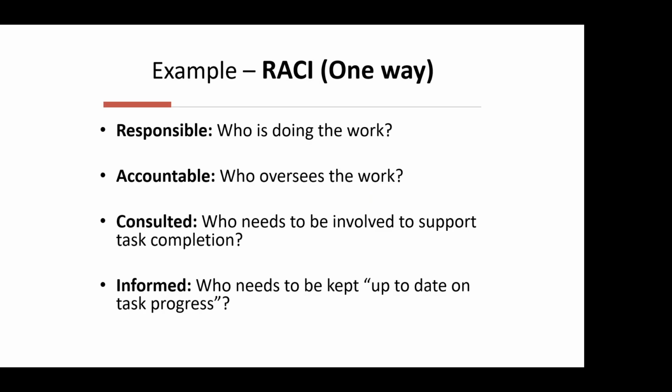Basically the bottom line is you want to list the tasks and the people that are going to accomplish everything by defining the R, who is responsible, which means who is actually doing the work. Then you want to talk about who is accountable. This is the person who's overseeing the work. And a lot of times, it's the same person in a lot of operations.